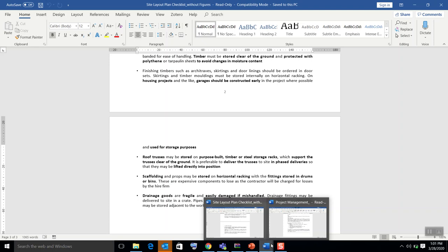You need to know how to provide access between facilities. Once a laborer enters the site, he goes to the office, then to accommodation, then to the stores, and then to the upper floors. For the tower crane, when it rotates, there should be no accommodation or other structures within its rotation circle — if materials fall from the crane, people in that zone could get injured. You need to know the radius of that circle.